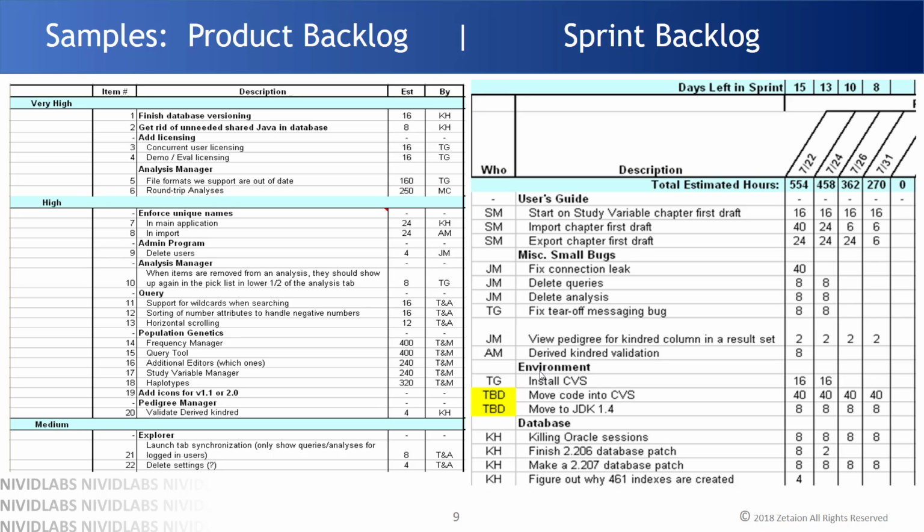If some case says TBD, meaning the work is already allocated to all the team members, this is the extra thing we have taken and estimated. If one completes, we can allocate it to them in the same sprint. In case it is not finished, it will go to the product backlog again. So again, the product backlog in a sprint meeting will be considered, and if those are priority, they'll be considered for the next iteration, the next sprint.